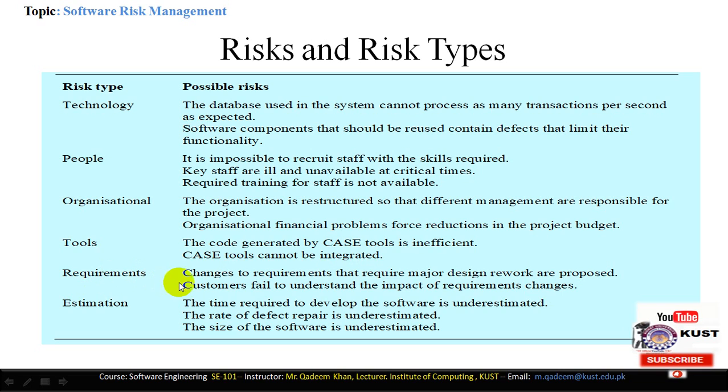Requirement changes is a very significant risk. Suddenly if the requirement changes, then it will create a problem, and major design reviews are required. The customer fails to understand the impact of requirement changes. Usually, the customer fails to understand what the serious effects on the development of the project will be. It has very serious effects because it will delay the project and we have to re-perform all the previous activities.